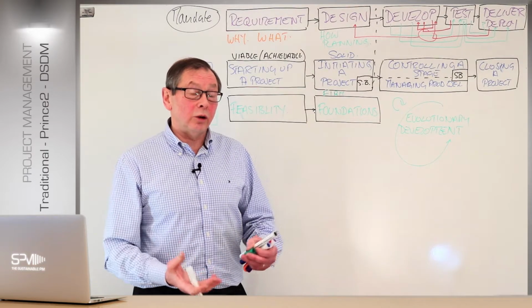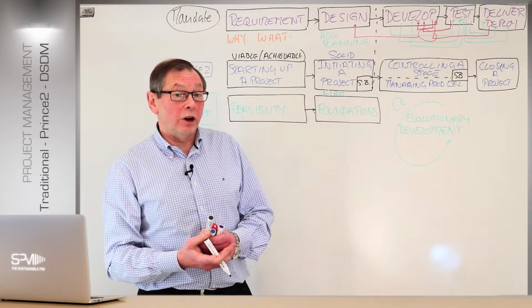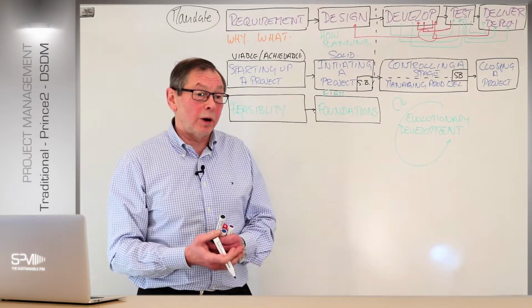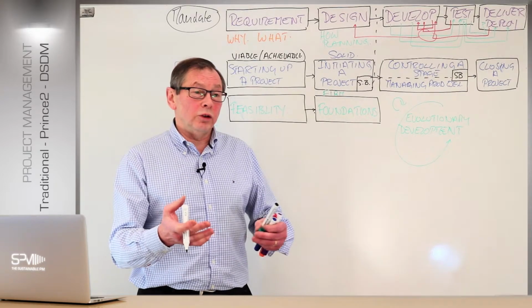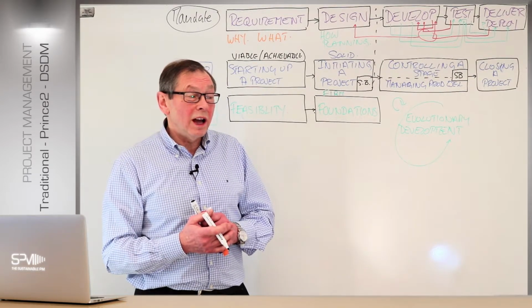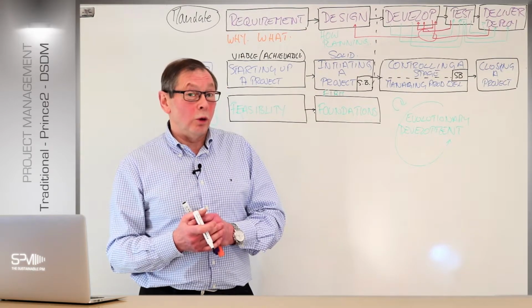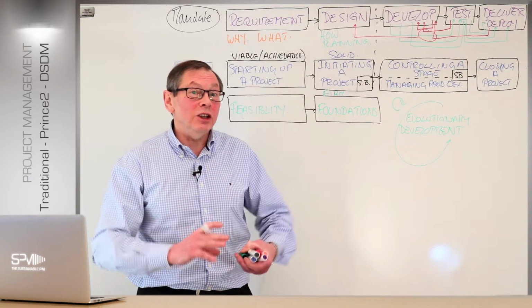Even if you've got the detailed spec, we'll put some part together, like a wireframe around a website, for example, or the framework around a part of the document. How do you like that homepage? What's that framework look like to you? You've got a specific idea, because sometimes the business might turn around and say, well, actually, maybe it wasn't quite what we thought. Here you're giving them an opportunity to put that change in place.